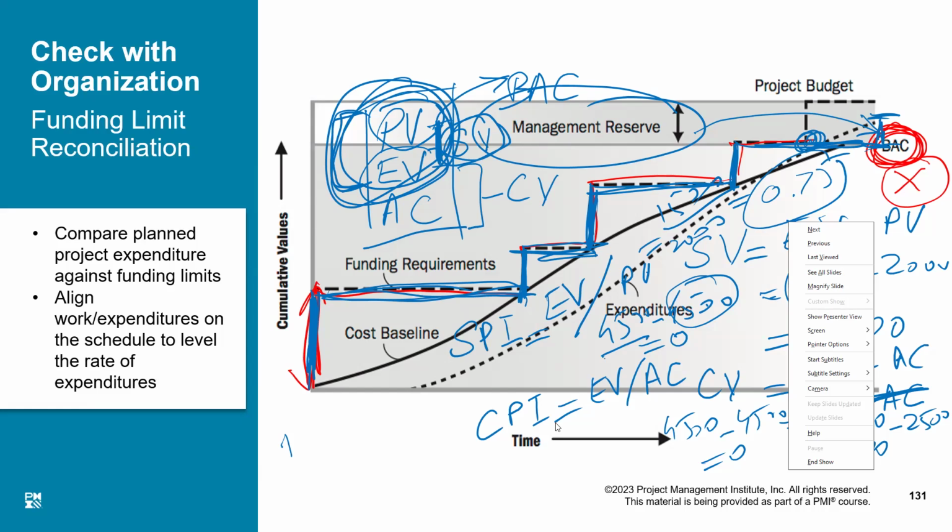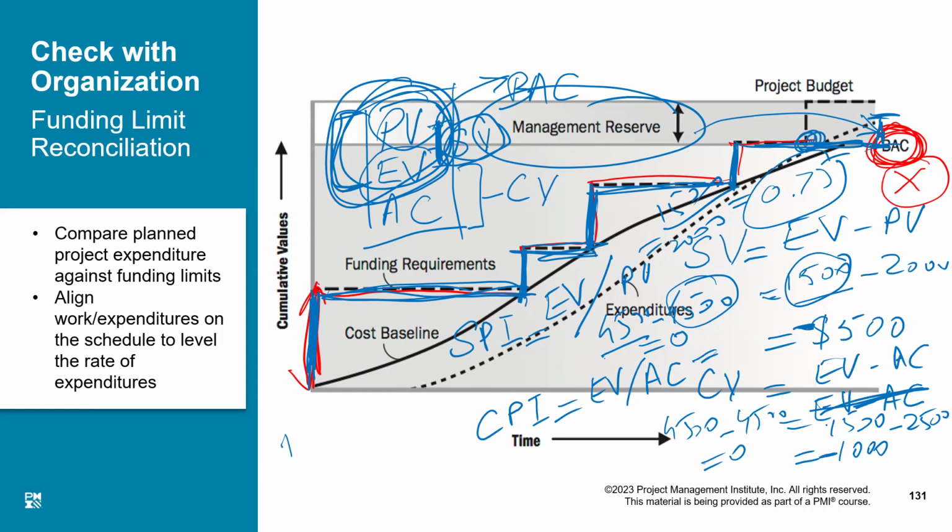Now let's apply the same thing to our CPI. So what do we have? The first month, we had 1500 divided by 2500, right? Again, the answer is maybe 0.6 or something like that. This is also bad. Got it? I suppose this does make some sense.